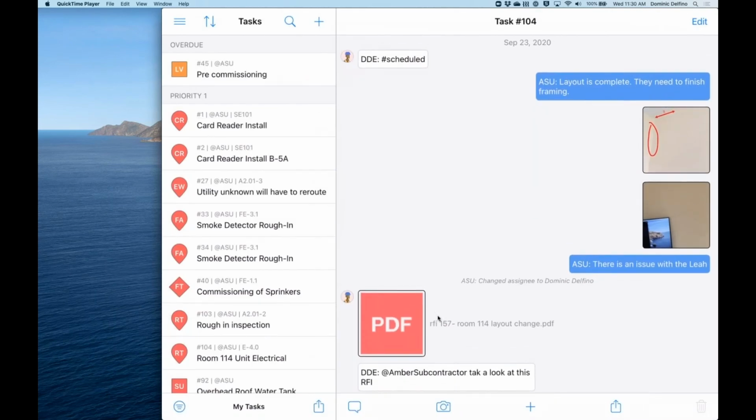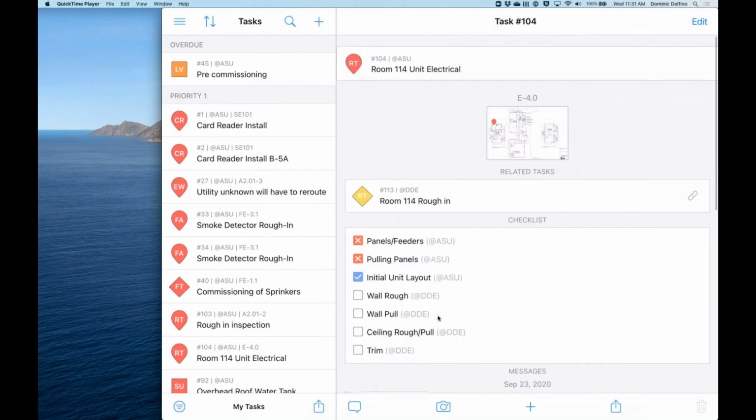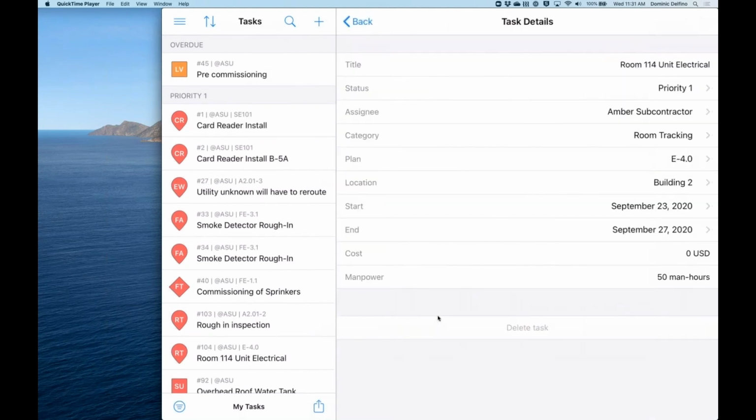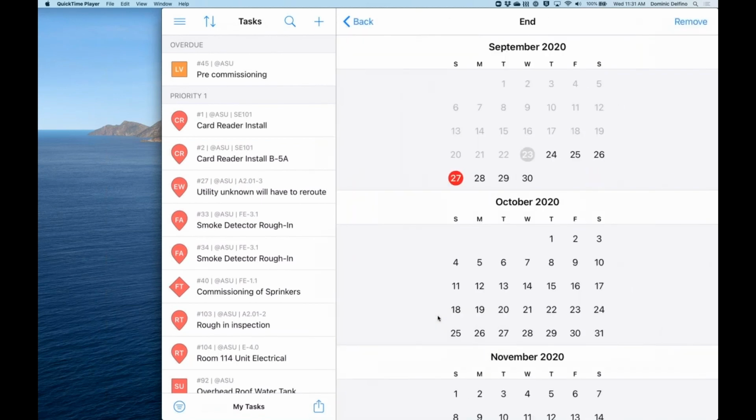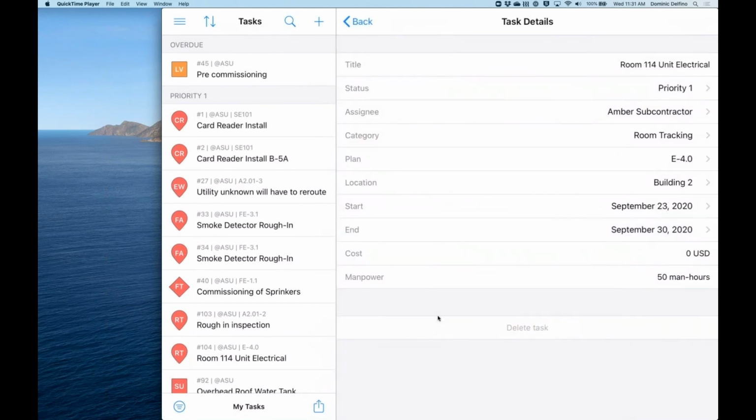So with everyone who is actually on the project, who is being assigned tasks, say it is your foreman or superintendents, they have their distribution list. They can respond, they can give you updates in real time on what's happening. And maybe that schedule is being pushed. So we have to go here and say, actually, this is going to be completed by next Wednesday. And so that updates here on the schedule, and it'll reflect back on my Gantt dashboard for me to see.